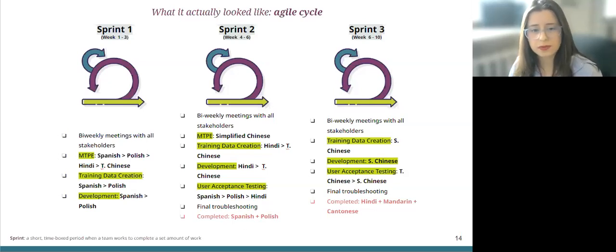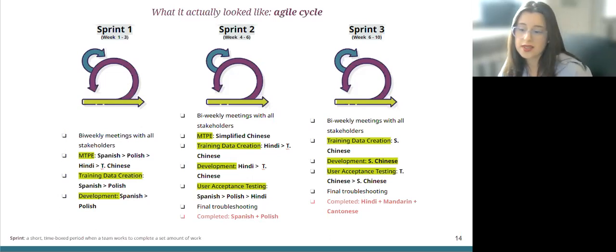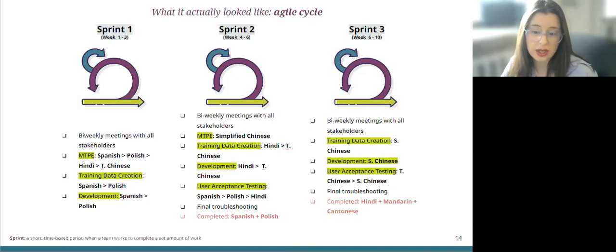3 to 4 weeks in total each, and we had meetings twice a week with all stakeholders involved and present, providing updates, asking questions, clarifying any confusion, and displaying the revised action items and the timeline. Such bi-weekly meetings already created a feedback loop on a regular basis for this project, and everything was being refined based on the feedback being provided in each meeting.